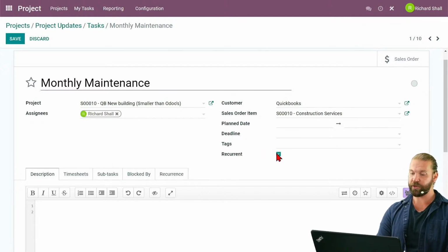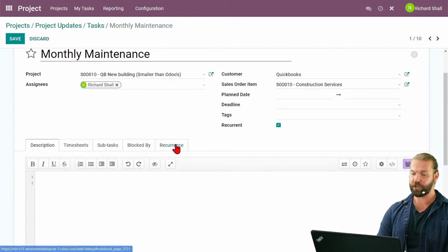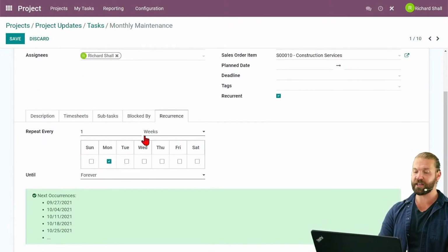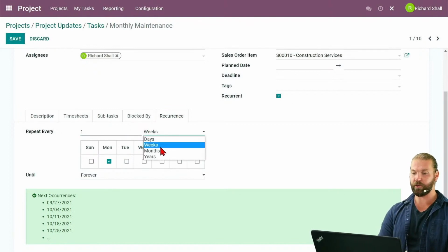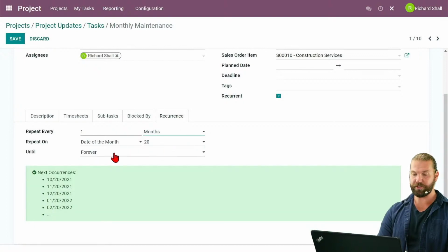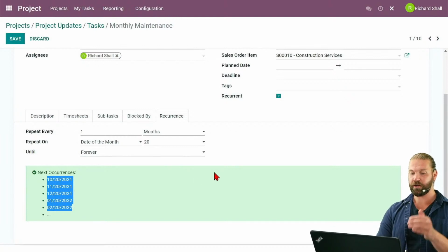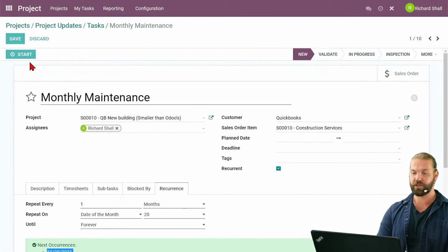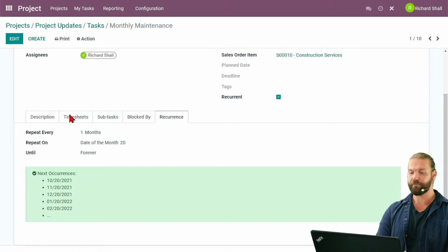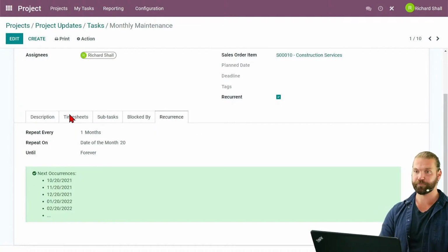And so we set recurrency. So if we select recurrence, this is the new view. This is a slight adjustment. This already existed in version 14. So we specify how frequently we want this to happen, whether it's weekly, monthly, or yearly. And now we specify how long it lasts, and you're going to see the recurrency here. So essentially, every month, on the month, it's going to create a new task to be performed. So that's the biggest change when it comes to the recurrency. No big changes from the previous version other than just the UI.